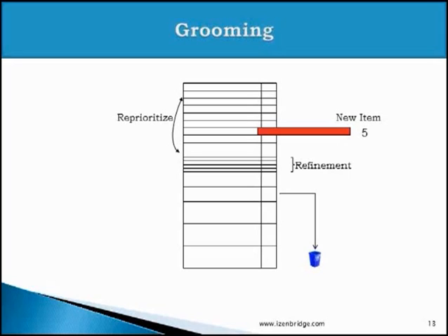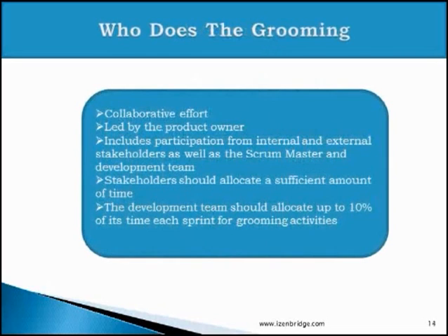We should also size it. So grooming also involved the sizing of newly identified product backlog items. And if we groom the product backlog well, we will always know the amount of work left in our current release. Quantum of work, the prioritization.